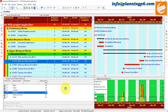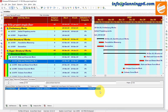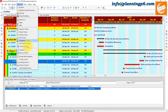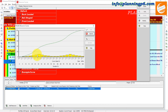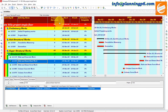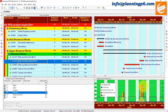Because we assigned the Double Peak curve — you can verify it in Enterprise > Resource Curves > Double Peak. It has two peaks: it comes up to peak, then low, then up to peak again and then low. That's why it's showing over-allocation like that. You can control your resources using this resource curve feature.